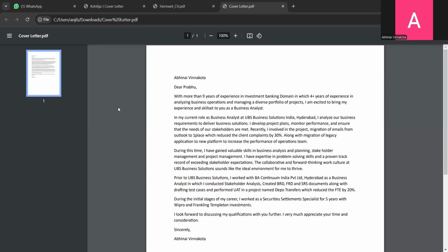And while doing that, sometimes simultaneously they will do the refinement as well to make sure they are ready for the next sprint. See, the DOR is ready only for this sprint. They have to make sure that refinement is done so that they have the DOR ready for the next sprint as well,